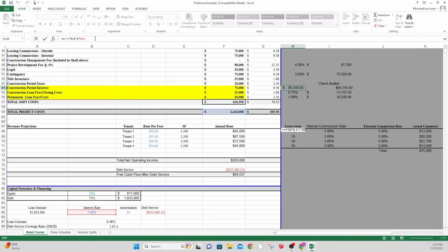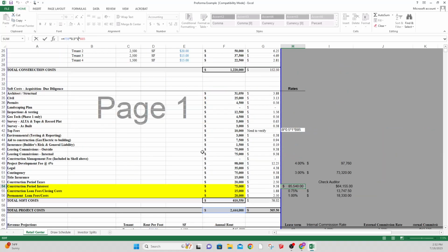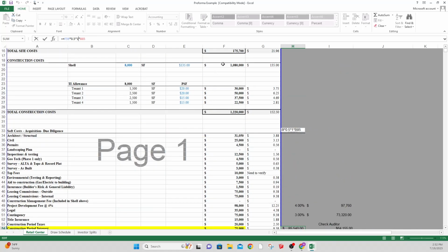And essentially, how you're coming up with that number is that's the total project costs, and the half comes from the assumption that there's going to be a draw on those construction costs. So essentially, you're not going to write the contractor a check for $1 million on the exact day that you close on this building.